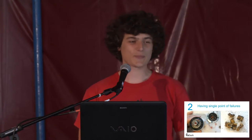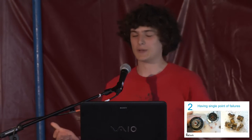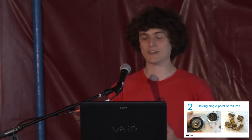One week before the start of the project, the Chinese motors arrived. One day before the start, the English motors arrived. Two weeks after the start of the project, we still had not received any German motors. At that two-week mark, we got a call from them saying, 'We just received your motors, but you haven't paid the pro forma invoice yet.' And we said, 'What? We paid it a month and a half ago.' They said no. So I called our finance department and asked them to look up that invoice from one and a half months ago. They responded, 'What invoice?' It turns out that someone had forgotten to send an email with the invoice to the right person in the finance department.